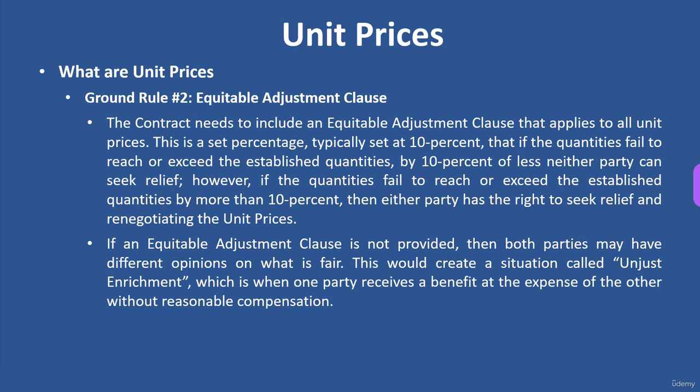So basically, what that means is, back to my 500 cubic yard example, I'll use simple math here: it was $10 a cubic yard, so they give you a $5,000 price. If the contractor only uses within 10% under, he doesn't give you a credit back.